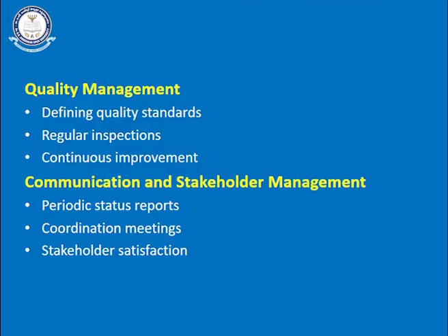And while executing this project, why? Because the project by nature is unique and new. So, in the execution of this project, we may come across many different challenges. What are the challenges? Basically, the first one is time overruns. We do not know what the activity is, how much time it requires, how much budget is required and what kind of skill set people need to complete the project. We may expect to complete within 3 days, but due to many reasons it may exceed to 5 days, then the complete project will exceed by 2 days more.